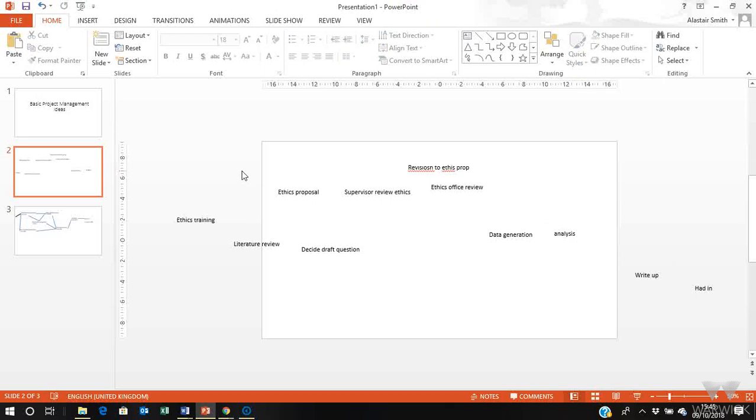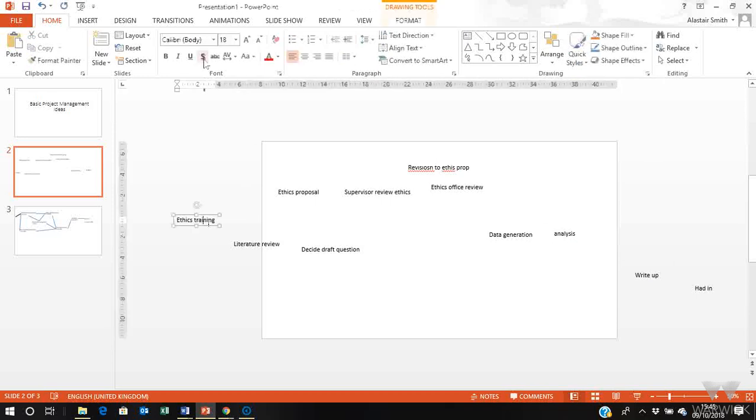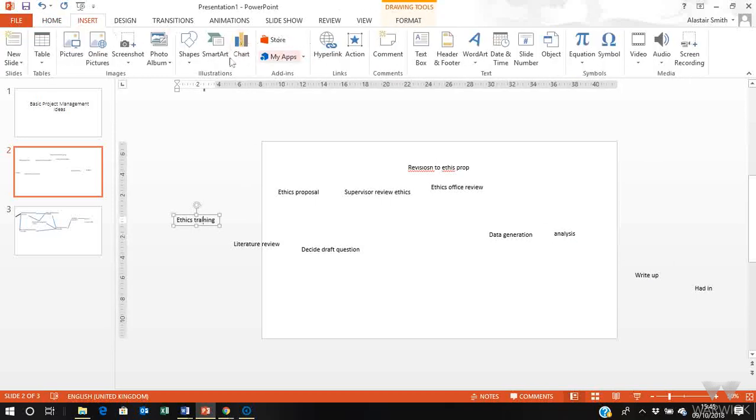The nice thing about PowerPoint is then we can start to show this very visually. So we can say, first thing I need to do is my ethics training. There's nothing I need to complete before that. So that can be a very first thing.